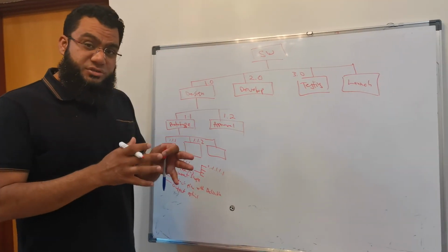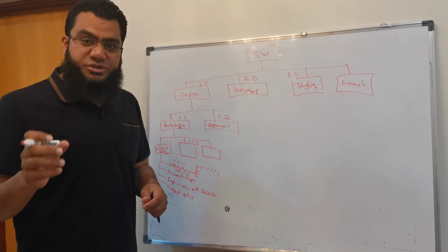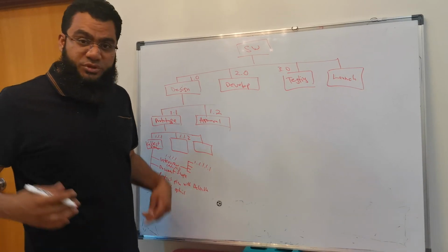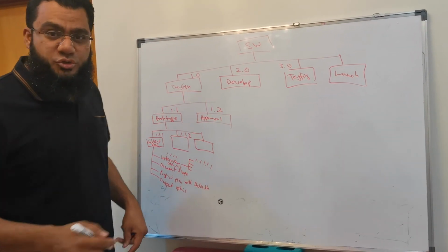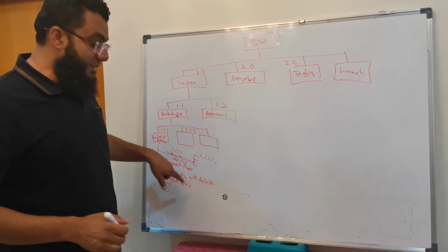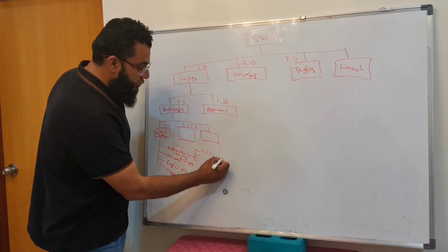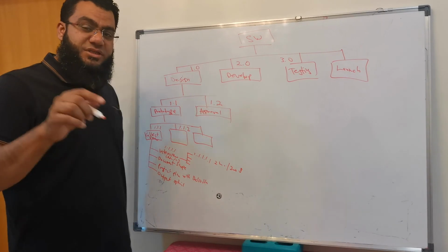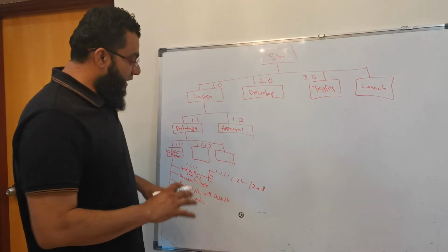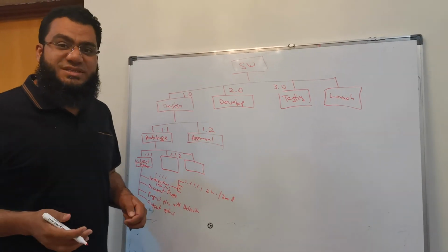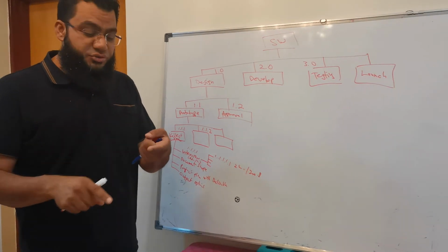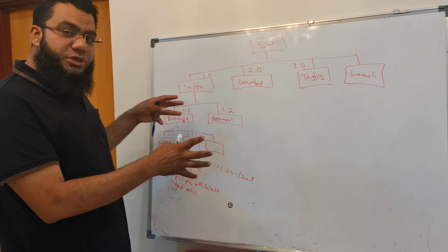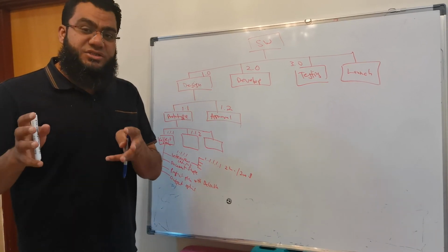Application software that you use has limited options. But when you do it on paper, or on your table with the team, you can maybe add more information. You can also estimate the time, like this activity is going to take, let's say, 2 hours and $200. So just like the sample WBS I have shown you, you're doing multiple processes at the same time: estimate activity resources, estimate activity costs, estimate activity durations. This will help you put up the proper schedule of the project.